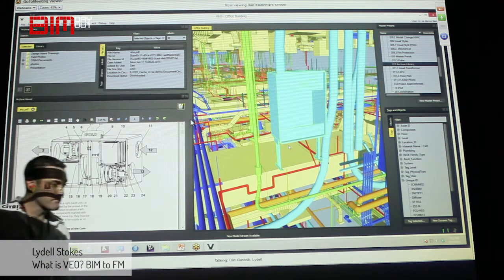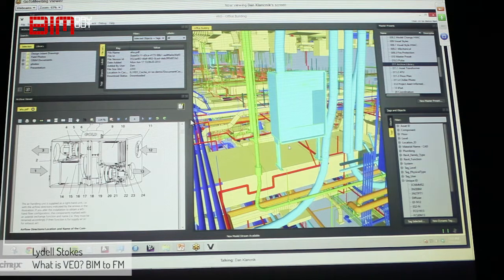No, I just want to add that Pulse can be extremely powerful, especially when we get creative about it. So we can use RFID tags to track data, say, of equipment as it's being installed, or if you're working on a heavy civil or industrial project, you're trying to coordinate a 400 truck concrete pour, we can use RFID tags on those concrete trucks, track where they are in time, staging on your site to best communicate and coordinate that pour in real time. We can put RFID tags on hard hats of employees, so when they scan into a project site that's updated, you see in real time where those employees are. And as we connect that data to the platform, you can start to do really sophisticated analysis about scheduling and efficiency of crews.